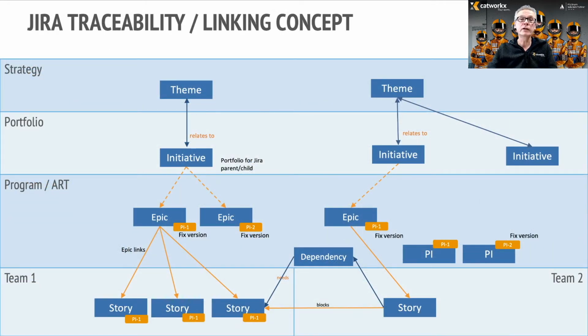On this slide, you can see the relations between the different issue types. Different stories belong to an epic, but can also be linked together via a dependency with different link types. PIs are defined via a fixed version, which is an entity of an epic. Different epics are linked to an initiative, which has a relation to a strategic theme. With this data model, we can cover the different requirements and data sights for developers, program and portfolio managers, release train engineers, and the management.